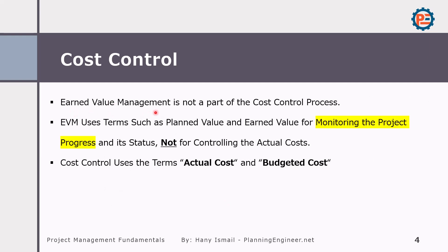Earned value management, or EVM, is not part of the cost control process, and this is something confusing a lot of us. Because we use earned value management terms such as planned value and earned value for monitoring the project progress only — this is not cost control. In cost control, we are dealing with actual costs and budget costs.